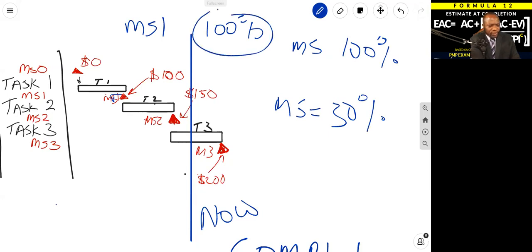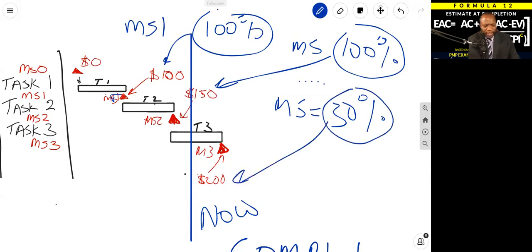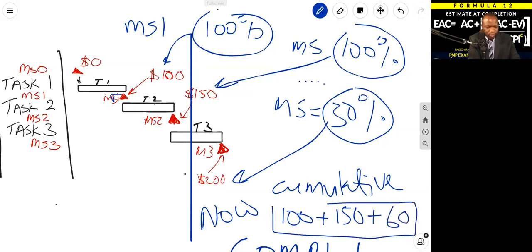Well, you need to multiply 100% of 100 is 100, 100% of 150 for milestone two is 150, 30% of 200 is 60. So you would have, at time now, cumulative earned value would be $100 plus $150 plus $60. That would be your earned value right now. And that would be earned value is $310.